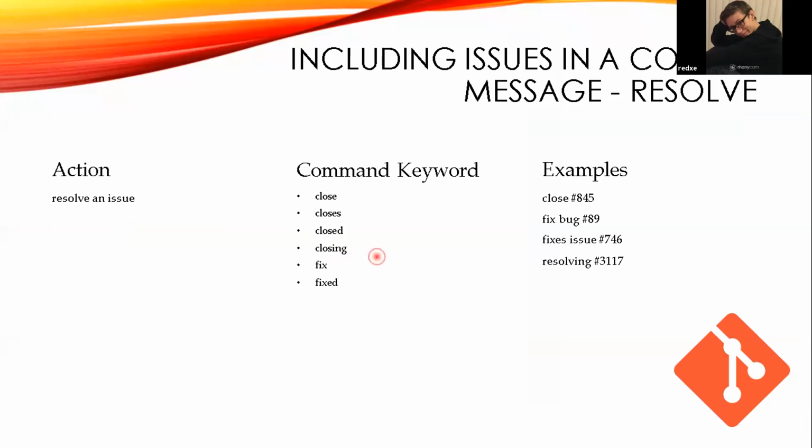There are a lot of phrases that you can use to actually resolve this. You could say closing, you could say fixing bug, fixes issue, resolving, and it looks for these words. I think that's all. There's one more. But synonyms to these, as long as you can remember one, that's all you need.